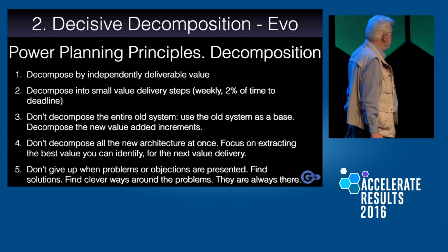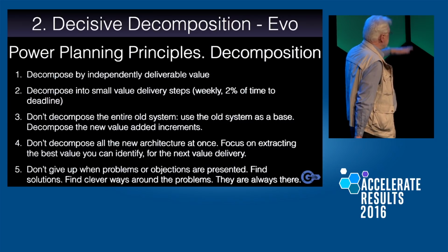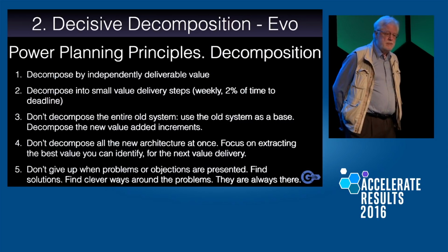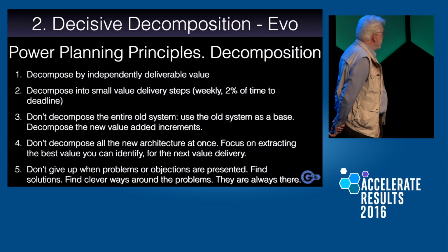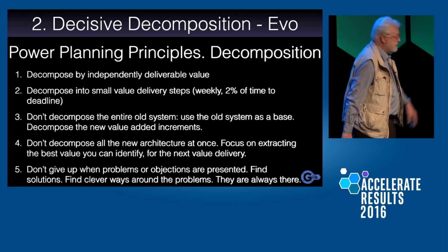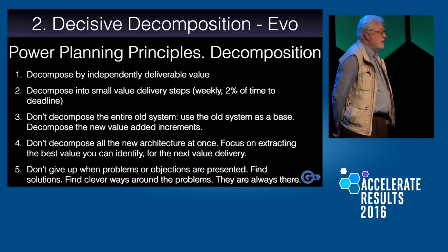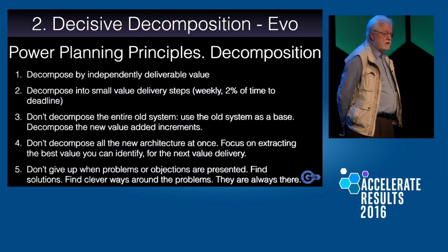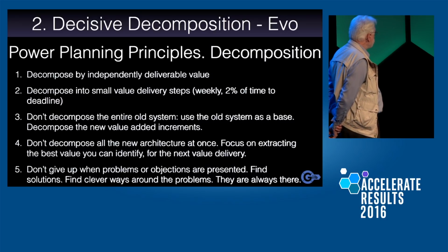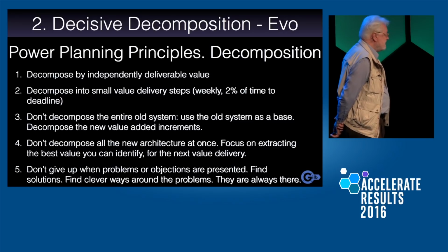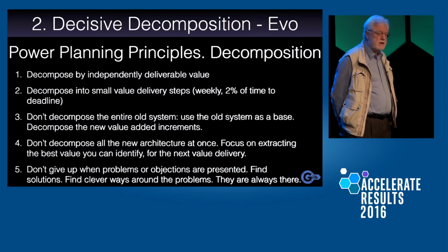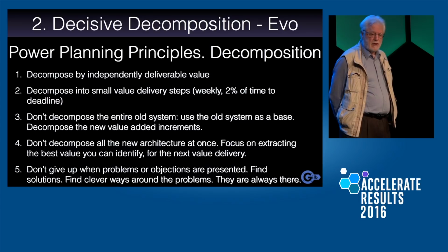But it requires decomposition. Now, some principles of decomposition, like I like to get down to 2% increments, and I found we can do it. And we have some power planning practices, different, we'll give you a peek at them. Some practical tools for doing it. So those are the principles, but they basically say decompose so you can deliver value early and in small increments.